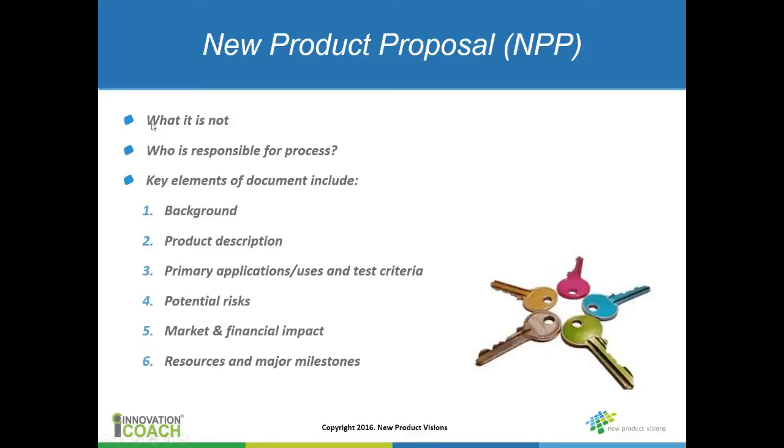I think at this stage of the game in most projects, there is a temptation in this marketing document to define when you're going to come to market with this product. And I think in a lot of cases that's a mistake, because if the project has a relatively high level of uncertainty, until you actually build a prototype, until you really know what you've got and what you need to develop and what the risks are, trying to decide when you're going to come to market with that can set the organization up for failure.